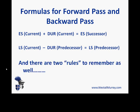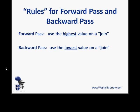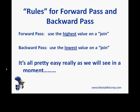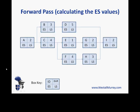There are also two rules to remember. During the forward pass, if activities are coming together — in other words, they join — we need to use the highest possible value given by the formulas from the things that join at that point. On the backward pass, if we have a join, we use the lowest value. So let's do our forward pass to calculate early start values on the network. The first thing you do is set the early start of activity A, the first one, to zero.